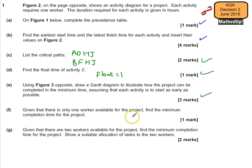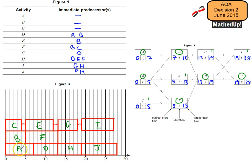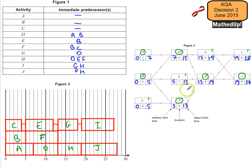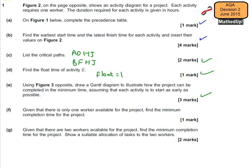Part F says: given that there is only one worker available, find the minimum completion time. Since each activity requires one worker, all activities have to happen consecutively. So I just line them up: A, D, H, J, then B, F, C, E, G, I. Adding the durations: 7 plus 5 plus 4 plus 8 plus 7 plus 6 plus 5 plus 6 plus 9 plus 8. That gives 12, 16, 22, 29, 37, 42, 48, 56, 65. So the sum of all those is 65 hours.